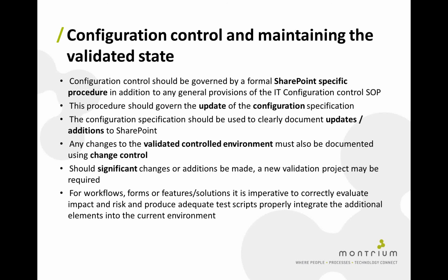And then for workflows, forms, or any features and solutions that you're deploying, it's extremely important to perform an impact assessment and a risk analysis, so that we can identify what exactly needs to be tested, and then we can produce adequate test scripts so that we can properly integrate any additional elements into the current environment.